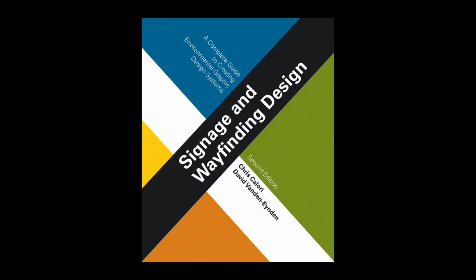Note that the term defects, as used here, includes not only fabrication defects, but a whole host of other problems, such as missing signs, signs damaged in shipping, signs mounted crooked or in wrong locations, sign installation damage to adjacent construction, and others. The message schedule, which already exists as a complete itemized inventory of every sign in the program, can be readily adapted for punch list comments, including the insertion of digital photos of problematic signs.